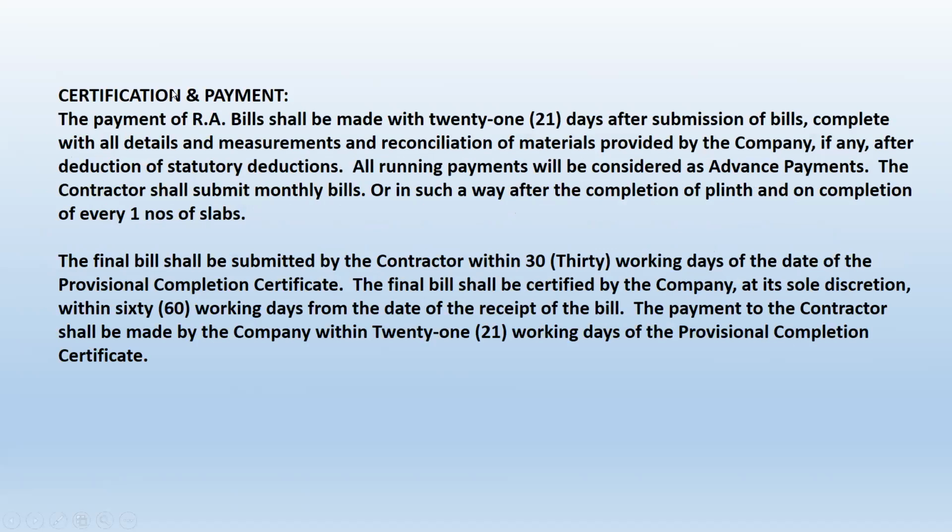Certification and payment. How the contractor is going to get the payment. What is the modality of the certification? It has to be identified, such as the contractor will get a payment after 21 days, 30 days, whatever the days, after completing a certain quantum of the job, which should be certified by the client. And you have to make it clear that all running payments shall be considered as a running payment, advance payment. The contractor has to submit a monthly bill or a 2 months once, according to your progress speed. Everything you have to mention.